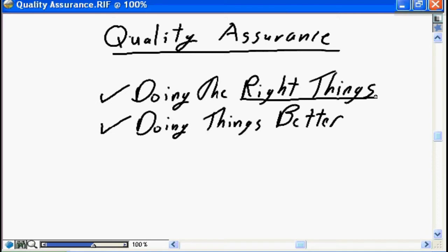If you have a walkthrough that's only attended by 1 or 2 participants, the walkthrough may not be as beneficial, as many issues may not be identified because you don't have the benefit of the right number of team members participating. So again, quality assurance is all about doing the right things as defined in the quality management plan. Quality assurance is about reducing waste, doing the right things right the first time. Quality assurance is ensuring that non-value added activities are not contained in the project, but all of the right quality added activities are in the plan, and that you're doing the right things.